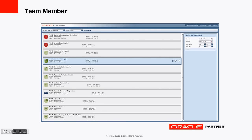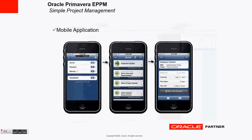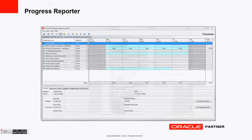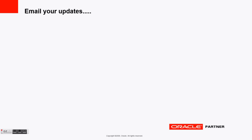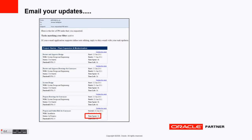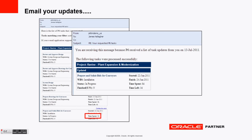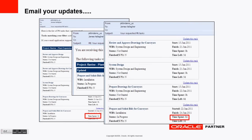Track progress and collect updates through a number of means: a team member tracks it like a to-do list, available on mobile; or track progress in a timesheet manner with Progress Reporter, tracking hours for each activity on a daily basis; or email your updates and update your project directly from Outlook.